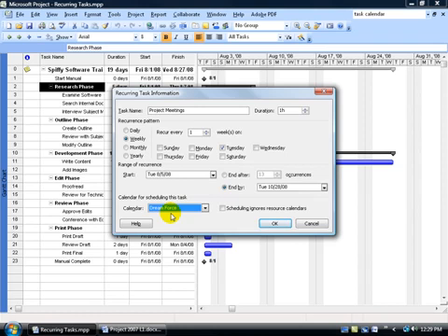So in any case, select it or not, or if you have another calendar that's specifically tied to those project meetings, like say for example, only the managers work from, let's say, noon to 5, in which case we can create another calendar and specifically have those working times here, noon to 5. And then when we insert the recurring task, we're going to say, look, we got to assign the calendar that has the manager calendar that they're available from noon to 5 to this task here. So that way we're not scheduling at funny times or trying to schedule at times that they're not available. And we'll go over this a little bit more in detail later, but to keep it simple, you can leave it as none or assign it your project and then go ahead and click OK.